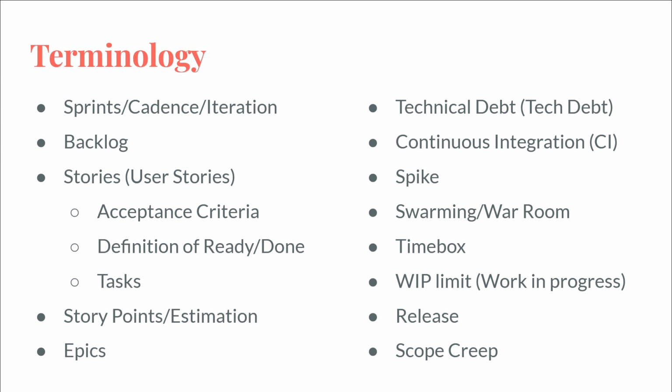And then you may have a definition of done, which is to say a ticket cannot be marked as done unless it meets all of this criteria. It must pass all of the linting. It must have unit tests written for it, or end-to-end testing written for it. It must have instructions for the QA notes. You must update the permissions for the users if there are new permissions being added in.